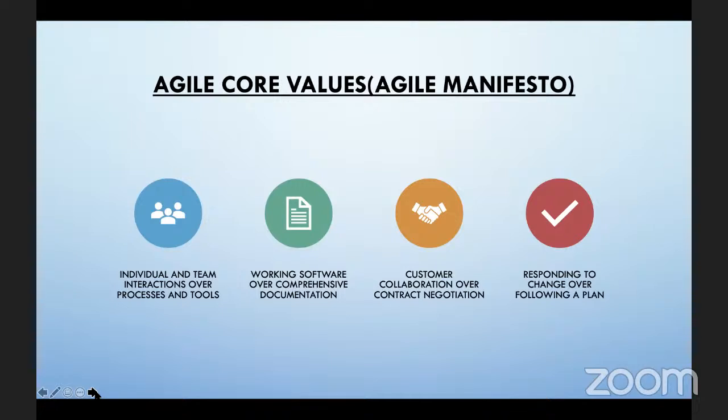So if you look at the waterfall, you start with requirement gathering, where you start liaising with stakeholders and talking to them. And then when that phase is done, it's completed. You move on to the next stage, design, where you start talking to the development team around technical feasibility, and you start getting into grooming and refinement of the product feature sets, taking a deep dive into the complexity of the feature, the amount of work required, and risks, assumptions, dependencies, etc.